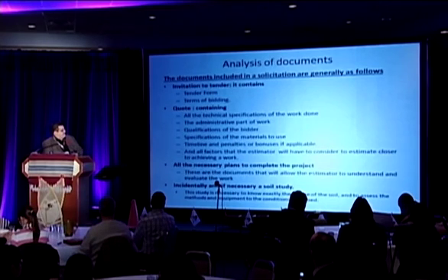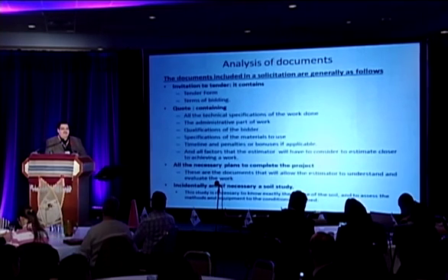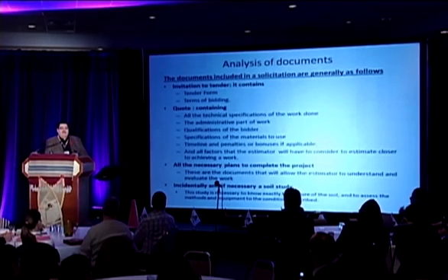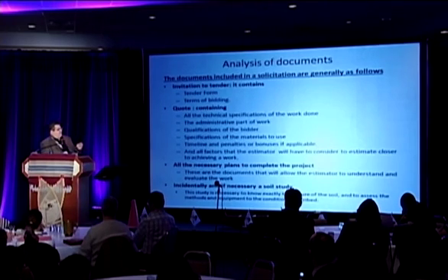Let me go back to the qualifications of the bidder. Many times they'll ask you for your RBQ licenses, bonding capacities. So before you embark on providing a bid, you should already, with the requirements, have a good idea, do I qualify to deposit a bid or I don't? If you don't have the requested qualifications, you might as well not bid, because usually they will not even consider your bid.